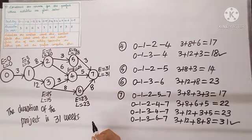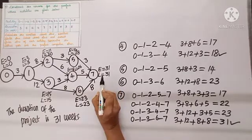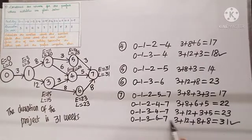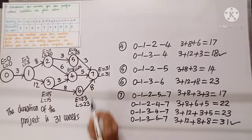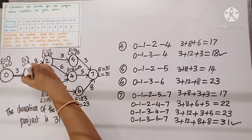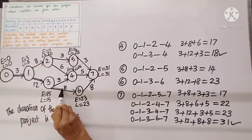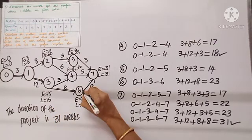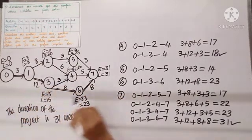The maximum duration of thirty-one was achieved via path zero to one, one to three, three to six, six to seven — that is the critical path. We draw double lines along zero-one, one-three, three-six, and six-seven to mark the critical path.